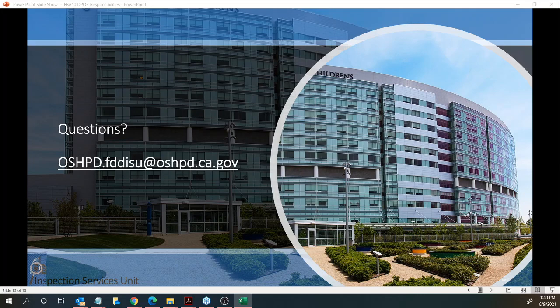So we kind of deviate ourselves from the AIA acronym. We don't use change orders, information bulletins, ASI, and all that. It's either a material alter change or non-material alter change. And when there's a material alter change, it requires amended construction documents, which means that OSHPD review and approval is required.